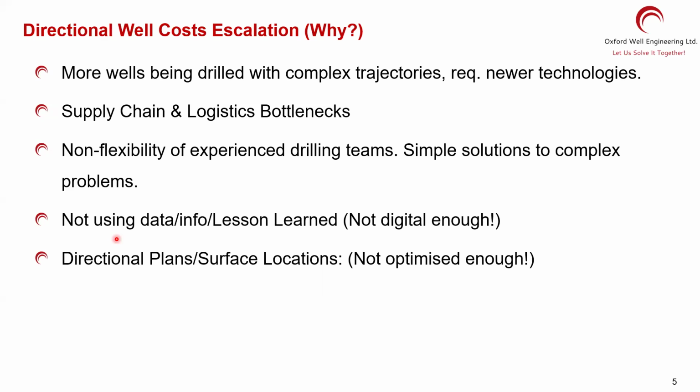You may be tight with surface location, so you can experiment with surface location. Same with the target. Targets are not fixed. If you talk to a geologist one day, she will tell you, this is the target. This is the best place I want to drill to. And when you talk to the same person after they have done some seismic analysis in a few months' time, they will have an entirely different target, different shape, different everything.